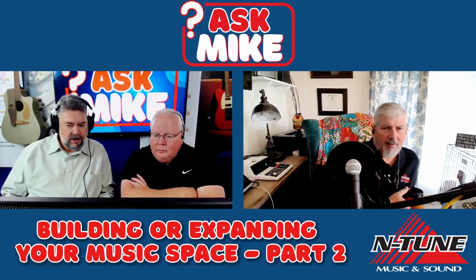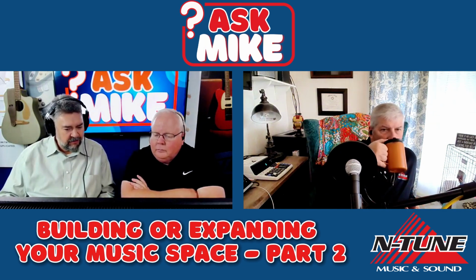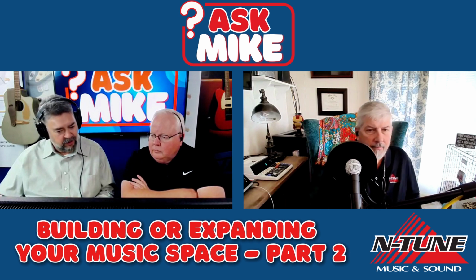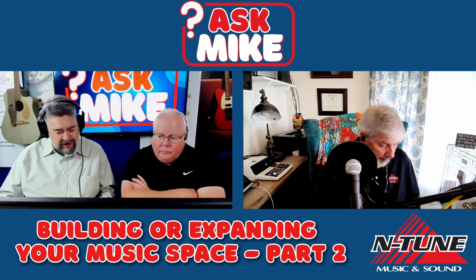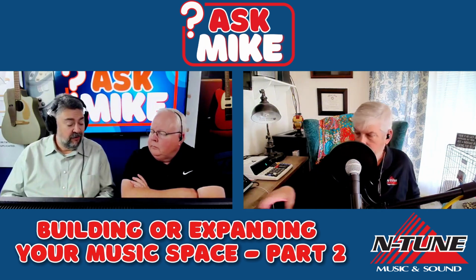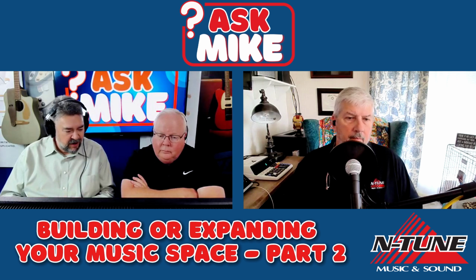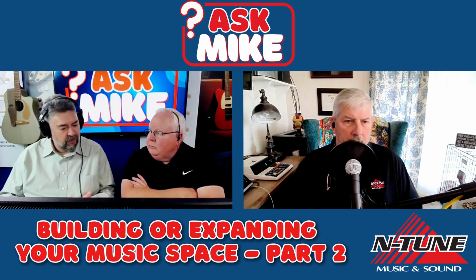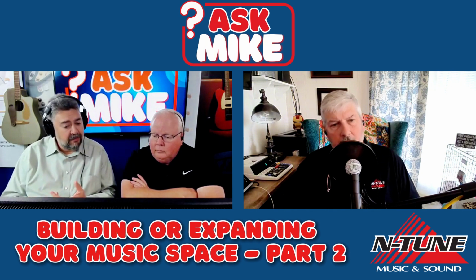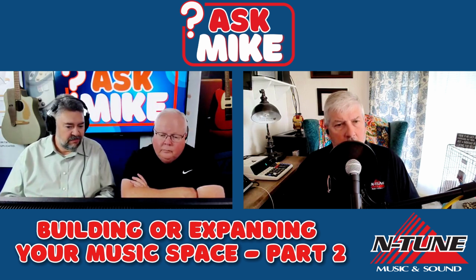So, here in Abilene, we just finished doing some facilities for band, orchestra and choir. It was about an 8-year project, and took some old CTE space and converted it to music facilities. And one thing I did was I went to Midland, Odessa, all over, just different facilities in the Metroplex, and I compared square footage. How much is your total footprint, and how much square footage do you have? And then I tried to fit all of the spaces that we needed: uniform room, percussion room, instrument storage, if necessary, a library, office space, ensemble room, and in some cases, maybe a second band hall or percussion performance room.